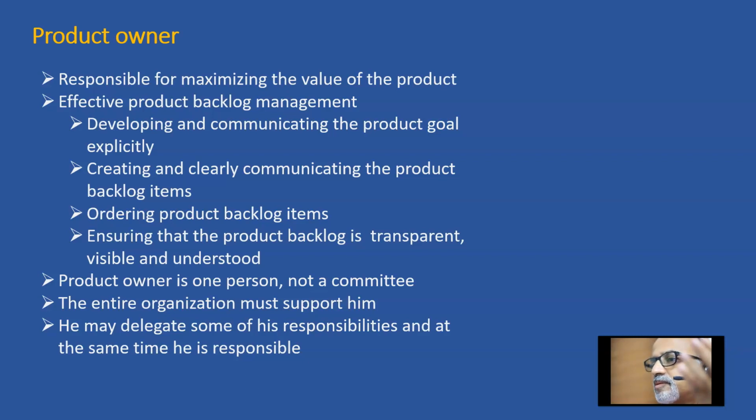So typically they use something like an Excel sheet, and keep on entering the probable features that may get into the product. And then they prioritize it, which features should happen first. They think about a minimum viable product as well. So which are the top priority features, in which iteration it should go. And for the immediate iterations, before starting the iteration or sprint, in Scrum the terminology for iteration is sprint, they would have elaborated this product backlog into fully blown details.